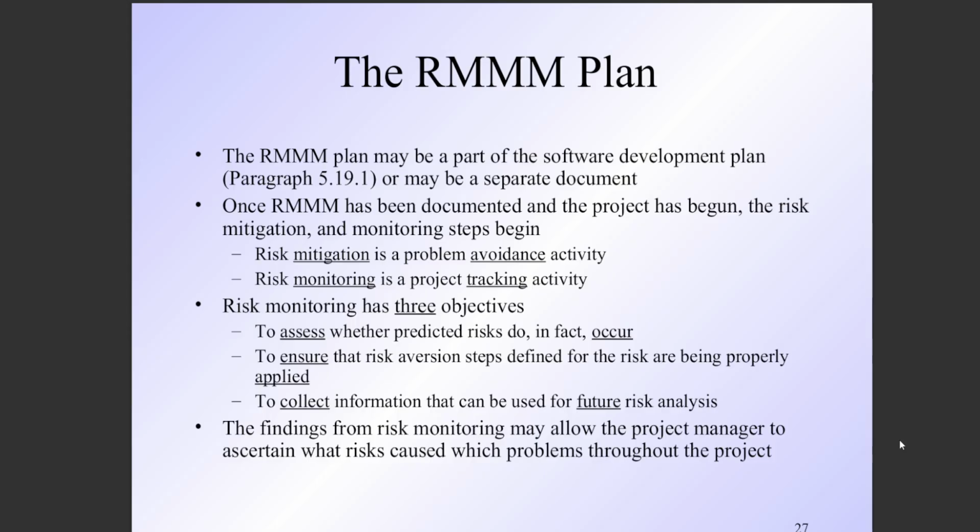This monitoring has three objectives. First, to assess whether the predicted risks do in fact occur. Second, to ensure that the risk aversion steps defined in the plan are being properly applied. And third, to collect information that can be used for future risk analysis. So these are the three basic steps of risk monitoring. First is to assess whether the predicted risks do in fact occur.